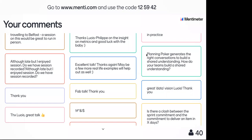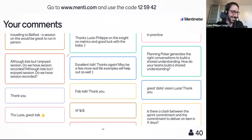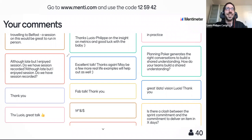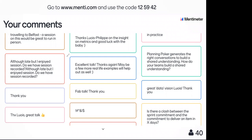For those not familiar with Lunar Logic's planning poker cards — they're not politically correct, but basically they ask: does it fit in the sprint, does it not, do we believe it fits, do we think it's too big, or do we not understand it enough? That's basically the conversation we want to have as a team — do we think we can do it, is it too big, do we know enough? Shane confirms: TFB and NFC. That's the conversation — not necessarily the numbers.